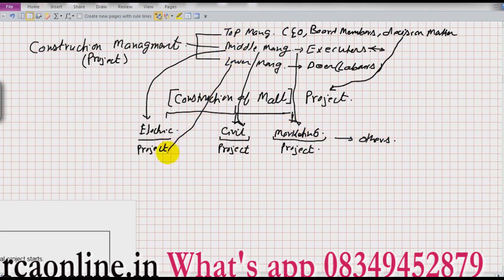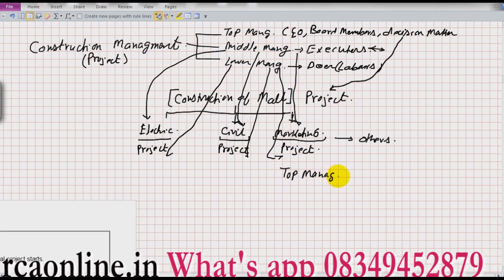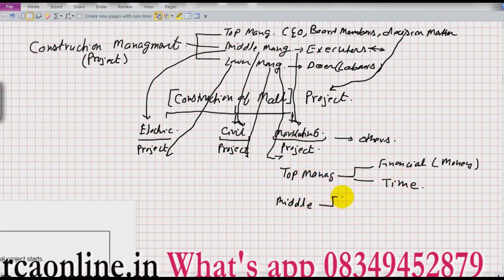The total construction of the mall is a project of top management, who are the decision makers. For middle management there are different parts — electrical, civil, marketing, and many others — and these are the people who execute. Now, for top management the project is different, hence their priorities are different. For top management the priority can be financial, which means money and time. For middle management, the priority is technology and time. Money might not be a concern for them because money is put in by the top management.